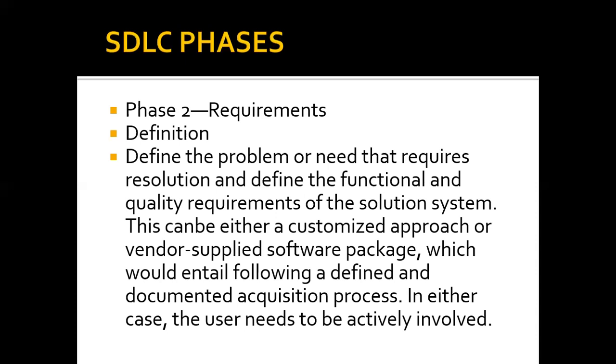So, we need a new requirement added or subtracted from the frozen requirements. Then you have to defend yourself, because you can get a query for that. Where were you when you were gathering requirements for this project? So that makes it official that everybody that needs to submit a requirement must submit it before December 23rd. And of course, there will be consequences if it is determined that you are taking us back without any justification. So that's scope creep. In the exam, please take note: baselining is the point that can be used to address scope creep. So ensure that you have maximum stakeholder participation at the requirement definition stage.